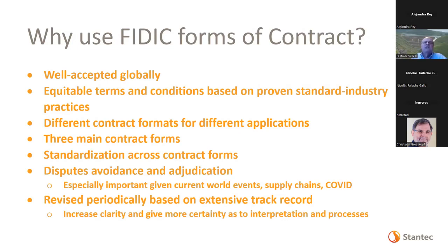They have standardization across contract forms, and that's handy in that some things, it doesn't matter what the form of contract is, certain things are consistent from contract to contract, like time to pay a contractor, for example, certain processes like that.